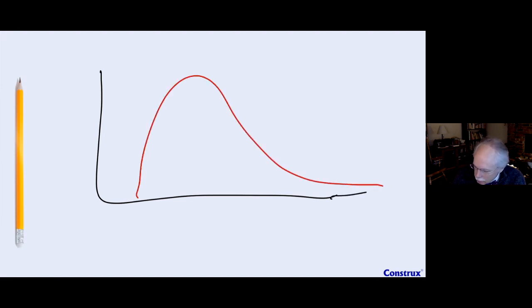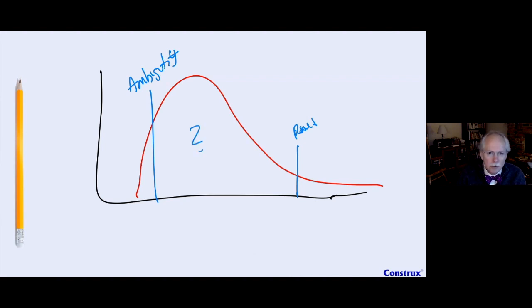When we're doing our points, we know how to guess this one pretty well. My data shows that this one, what I call ambiguity, we're pretty good there. We're pretty consistently hitting that, right? And with a little mental effort, we're pretty good at hitting a promise number too. The thing is that in here, we're not good anywhere in between for the most part. We're really pretty crappy. So when we look at what people come up with as the most likely, it's sort of like, well, I gave you this ambiguity number here, and I know that my gut is always optimistic, so I'm going to put a little bit more on that to get the one I think is most likely.